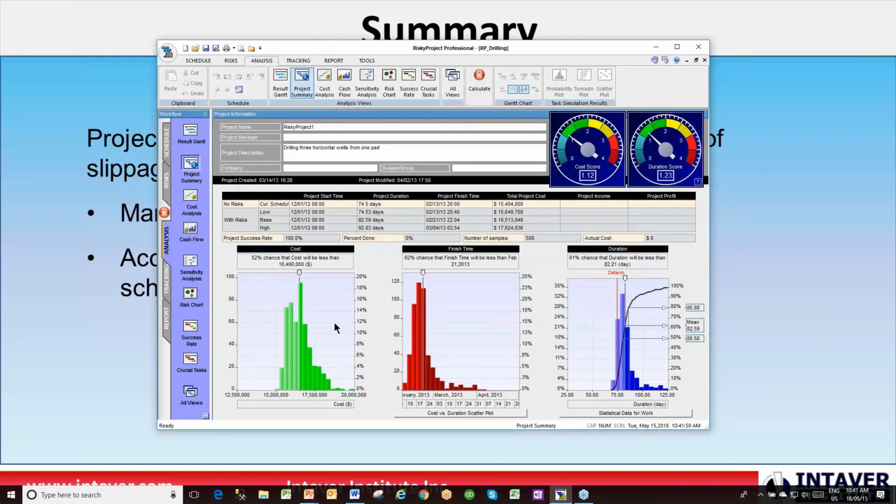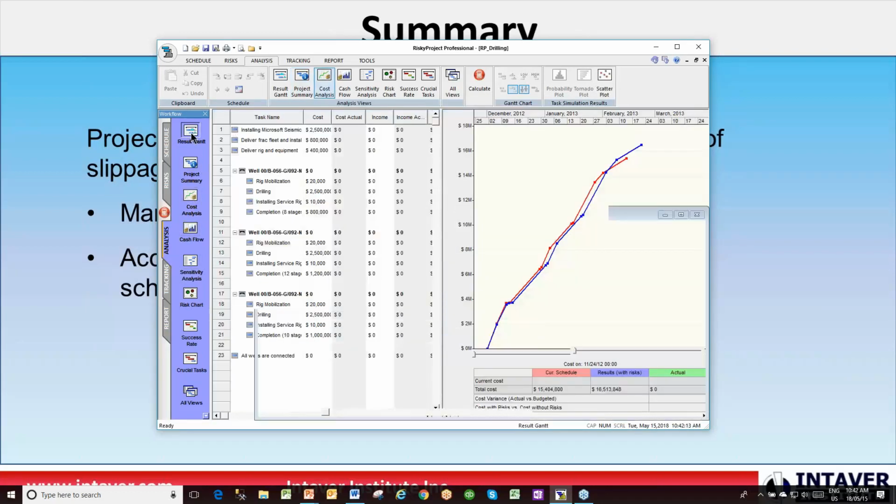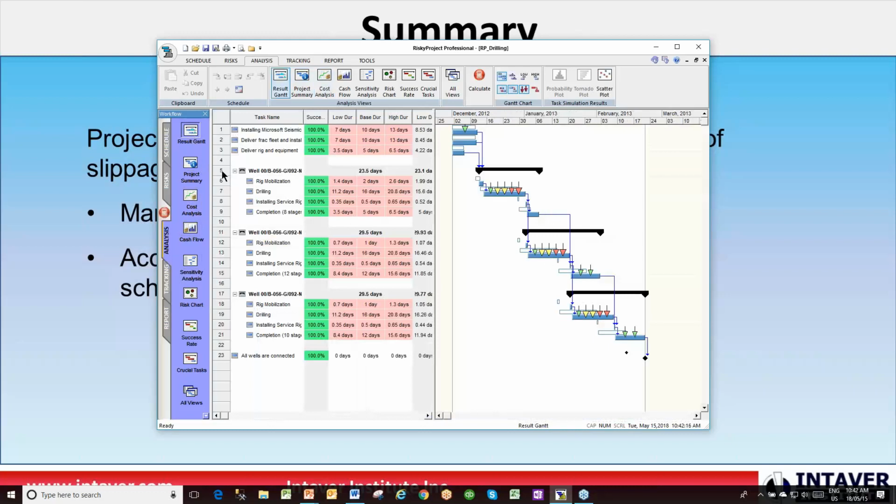Again, we could do that also for the cost. Typically, when we're setting cost contingency and margin, the best practice is to set it at the deliverable level, so that once we've finished an activity and completed it and are moving on to the next one, we can retire that. So if you want to see what sort of contingency and margin you should be setting here,